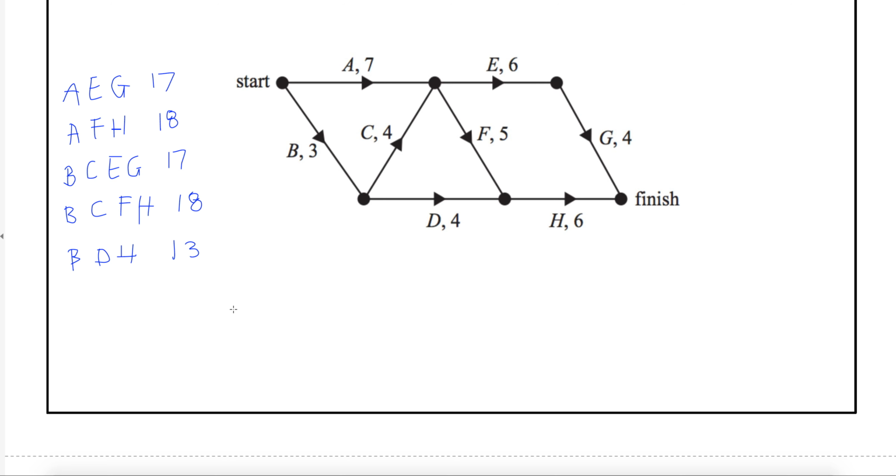So this is actually possible. You can have more than one critical path. There is no limit, so it is possible that you could have even more than 2, more than 3. All this means is there are less non-critical activities. There are less activities in the network that could be delayed. So the more critical activities that you have, the more risky it is, obviously, because it's more likely you might get a delay. And if that delay happens on a critical activity, you're delaying the whole thing. You're delaying the whole project. So just know that it is possible.